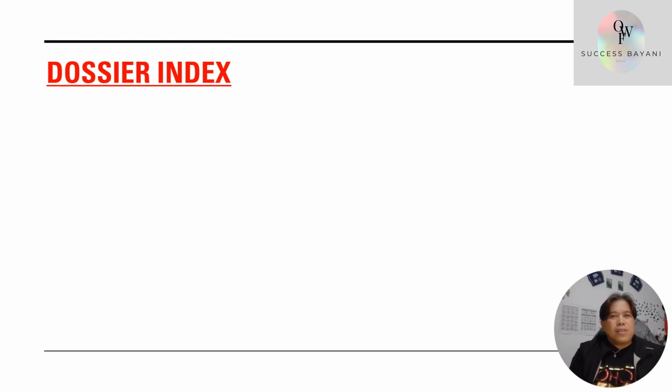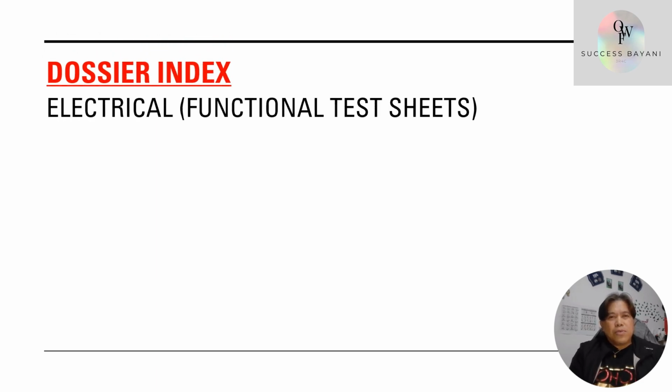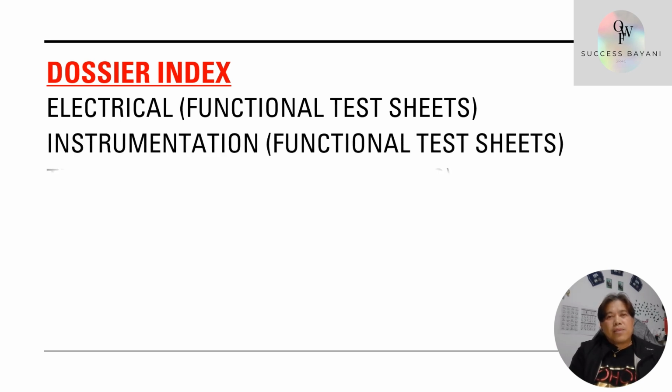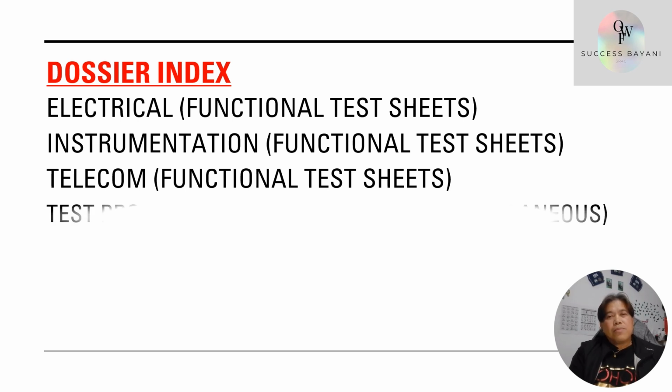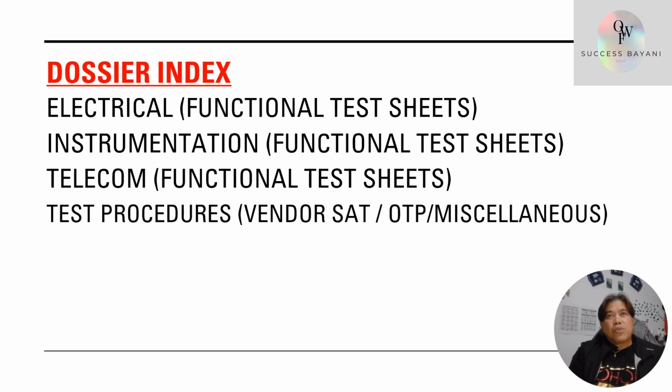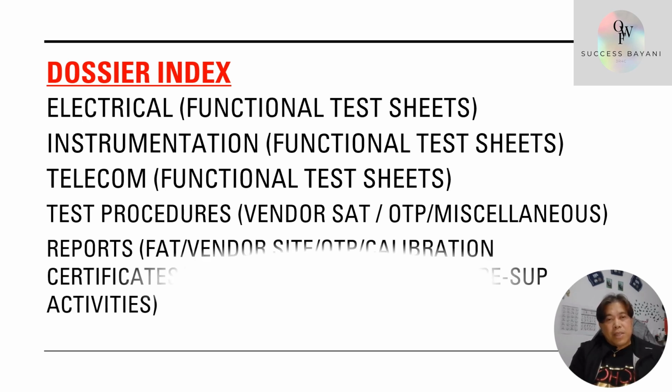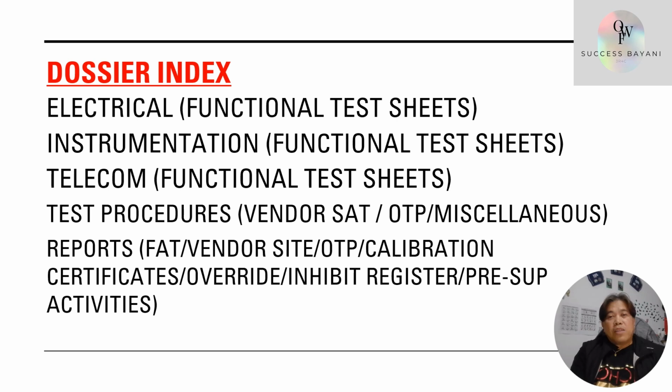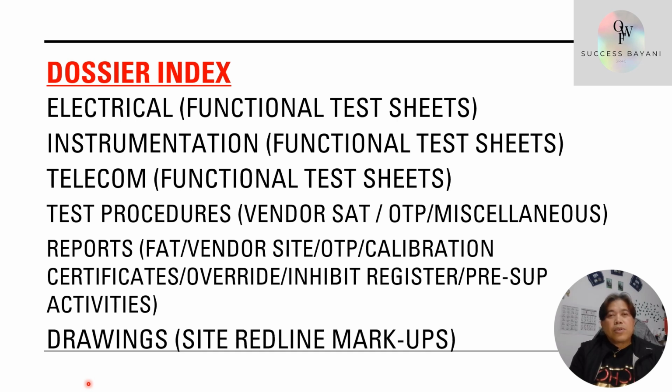So dossier index, this is the continuation for our RFHO. We have electrical functional test sets. So all the testing, all the reports must be there. Okay? Instrumentation functional test sets, telecom, test procedures, vendor SAT or any OTP miscellaneous reports, FAT sites, and OTP calibration certificates, inhibit, etc. So this is all the requirements in our dossier index.